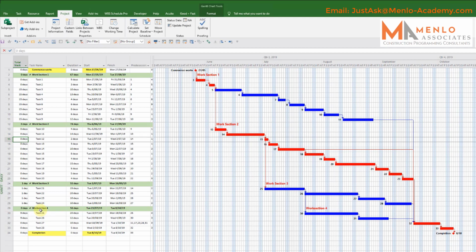And setting up an indicator is basically setting up a formula in a custom column that looks at how much time there is on the slack, and if the slack is within a set range, it will give you an indicator. And what I'm going to do now is show you how to set one of these up.